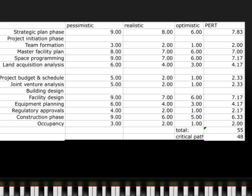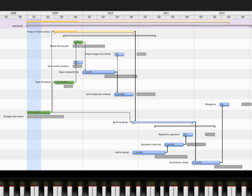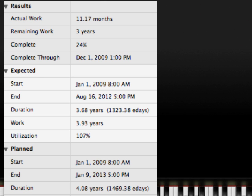This is a Gantt chart for question 8. Although it is difficult to read, I will highlight the main characteristics. The green activities have already been completed. The grey boxes indicate the planned duration of each activity, calculated using the PERT technique shown on the previous slide. The bolded arrows connecting specific activities show the critical path. For this example, I allowed Merlin to calculate the rate of performance for me. Merlin states that the project is about 24% complete, meaning the rate of performance is about 70 to 75%. Therefore, the project should end earlier than planned.